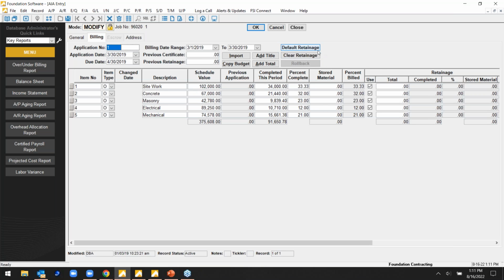We also track retainage. So all of the QuickBooks users of the world that are logged in here, no workarounds for retainage, no double entry. This is a true retention process. You can just tag a percentage to the job record, and then it knows what to calculate moving forward. Now that retainage does show in its own column on the aging report. So not only does it not require a separate entry for retainage, it also keeps it separate on the aging, so you're not showing a bunch of current due balances on that aging that truly are not. True retention process, again, with us being designed for construction.